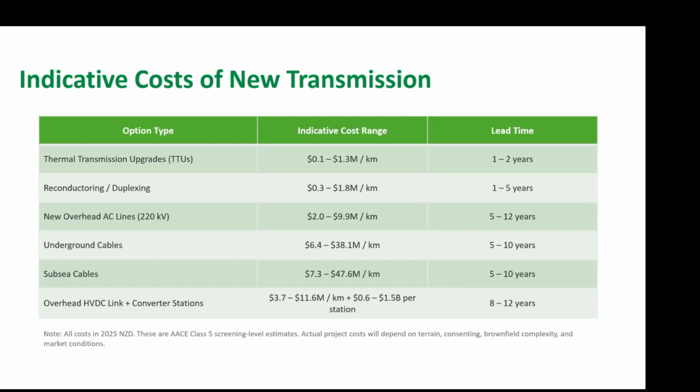Yeah, and some of those outputs are on the screen. It's worth noting that while those accuracy ranges are applicable to an individual project, and it makes it hard to make decisions on an individual project with those wide accuracy ranges, when you start to build up those projects in the program, you'd expect the project costs to be distributed throughout that range, and that creates a tendency towards the mid-point of the range. So again, perfect for a program level estimate. We're not saying any of the NDPs would have that wider accuracy range, but by some statistical magic, you pull the accuracy range in there.